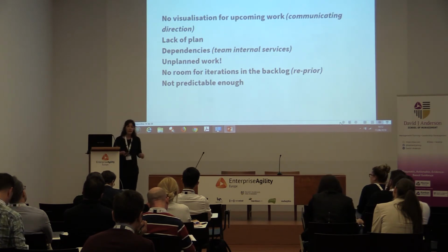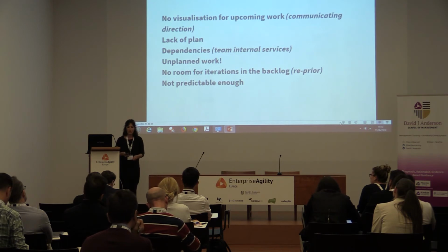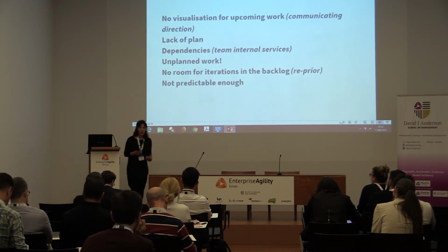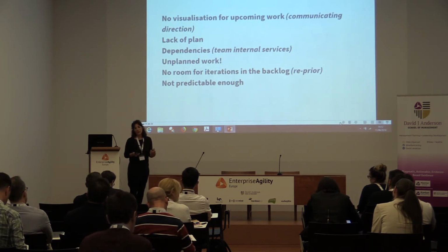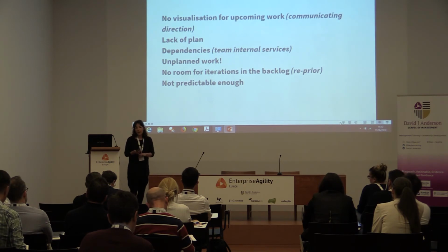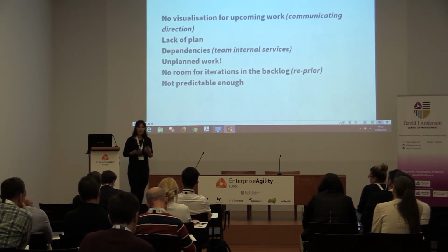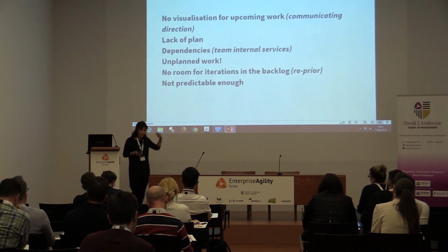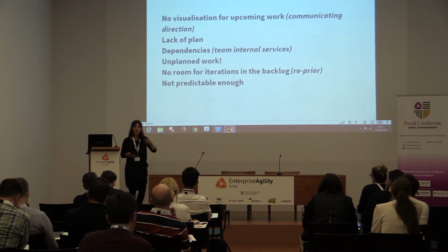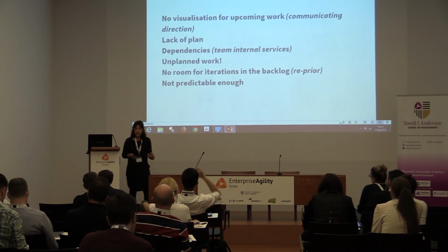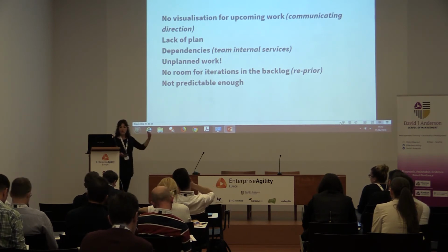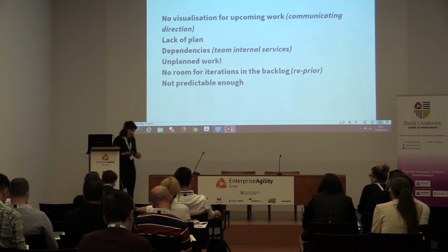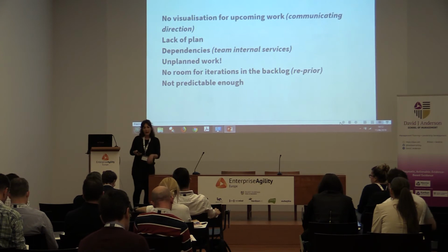The commitment from the team that we need to achieve dates as well. The dependencies, internal ones in the team. As in many teams, we are working with multiple skills: UX, backend, front-end, QA sometimes. So all of that was a big problem for us. Sometimes the backend work was done and waiting for many, many weeks for the front-end one to be delivered, to be pushed to production. This is something that we cannot afford, because time to market then increases.